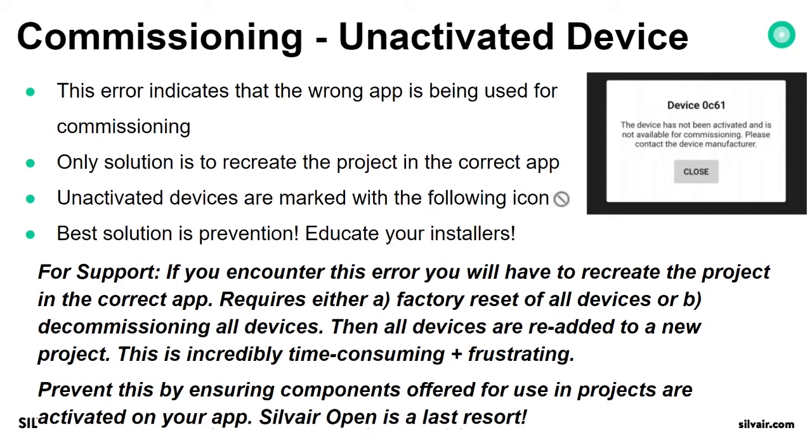This requires either factory reset of all the devices or decommissioning all devices, then all devices are re-added to a new project. This is incredibly time-consuming and frustrating. That's why we focus a lot on planning and proper usage of proper applications. So we can prevent this by ensuring components offered for use in projects are activated on your application.